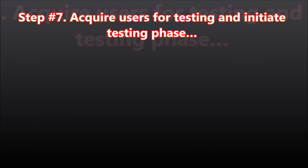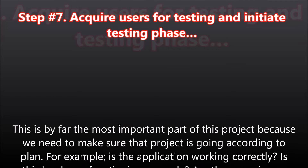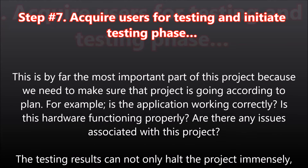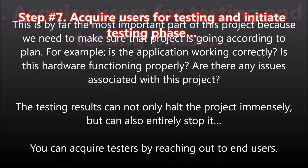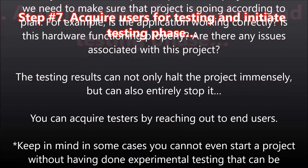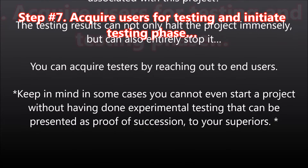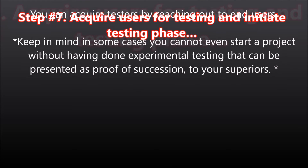Step number seven: acquire users for testing and initiate the testing phase. This is by far the most important part of the project, because we need to make sure everything is going according to plan. Is the application working correctly? Is the hardware functioning properly? Are there any issues associated with this project? The testing results can not only halt the project significantly, but can also entirely stop it. You can acquire testers by reaching out to end users. Keep in mind that in some cases you cannot even start a project without experimental testing that can be presented as proof of success to your superiors.